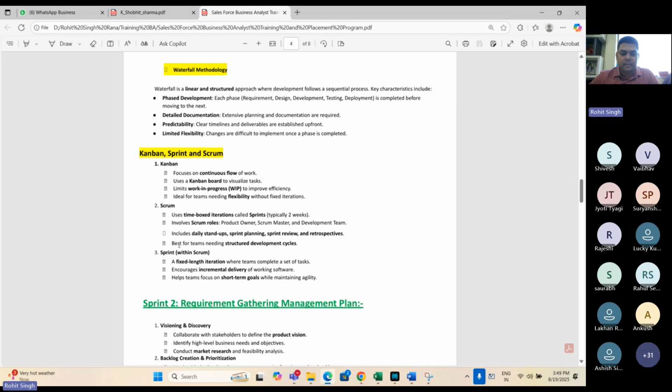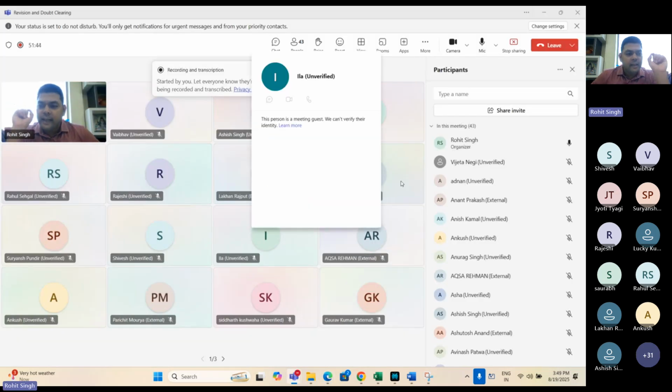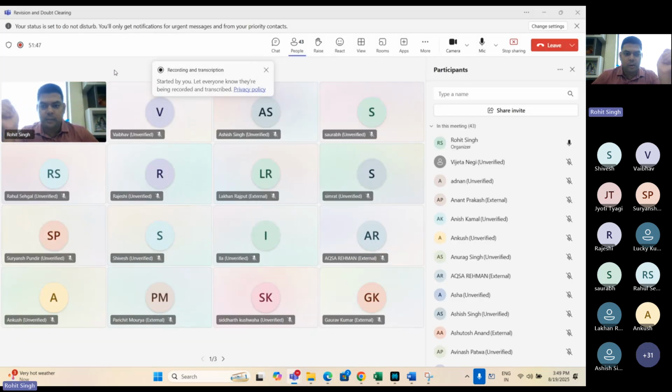There are four Scrum ceremonies: daily Scrum call or stand-up call, sprint planning, sprint review, and retrospective. Daily Scrum means, whether on a product team basis or a complete team basis, I'm connecting with my team for, let's say, 5, 10, 15 minutes, and I'm doing the daily Scrum. Whatever tickets I'm going to do today, I'm discussing that on a unit basis.